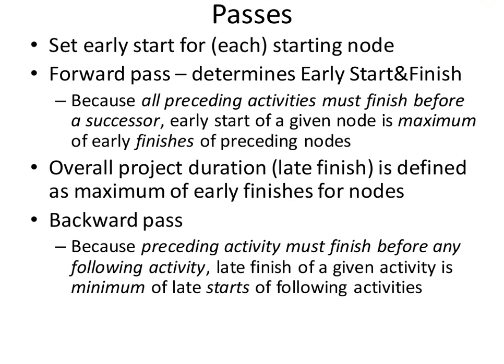So basically, in this algorithm, we're going to set the early start for each starting node to some reference value. And for the sake of this, we're going to start at day 0. We're not going to make it March 6th or something like that, some real-world date, although we could just as well. We're just going to refer to it, without loss of generality, as day or time 0. And we're going to go through 2 passes. One will be a forward pass. It's going to take O of n time. We're going to go through each task in turn. And one will be a backwards pass.